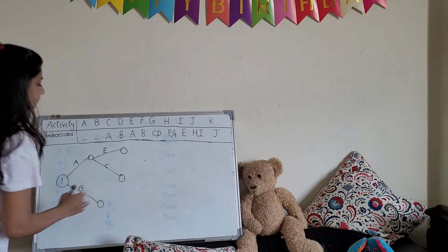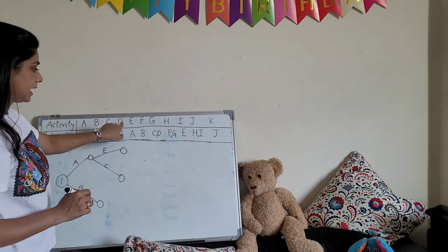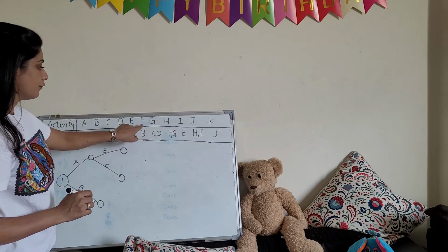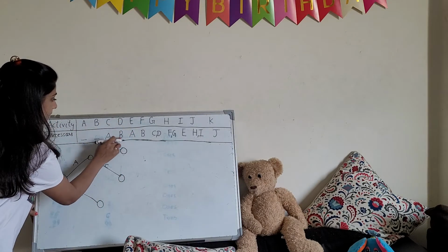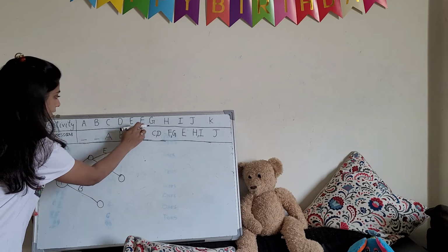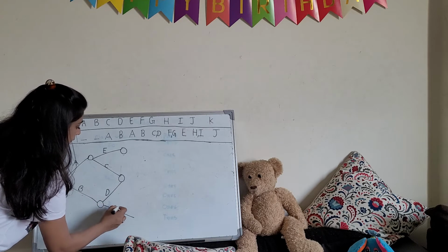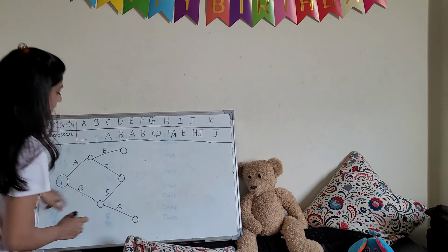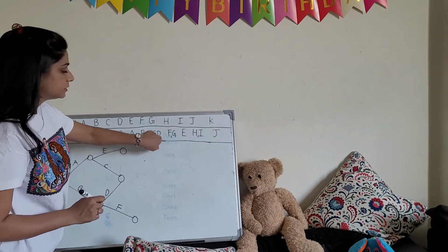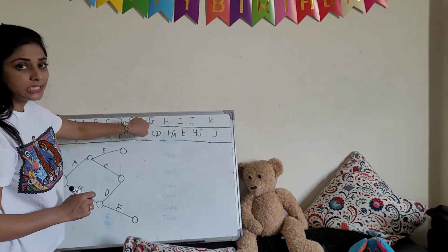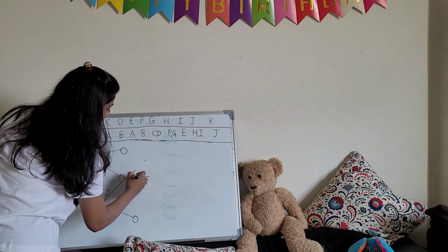Now next is B. B is the predecessor of activity D, and here also B is the predecessor of activity F. So activity B is here, B, D and F. So how we will do? D and F. We combine this D activity to C activity because C and D are the predecessors of activity G. So from C and D we can perform G activity.